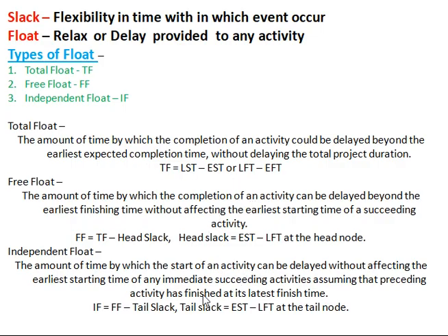All their definitions are addressed here, but before that, slack or float means how much relaxation, flexibility, or delay can be provided to an activity or a node without disturbing the total duration of the project. In the concept of float, for total float, free float, and independent float, I have given the formulas.